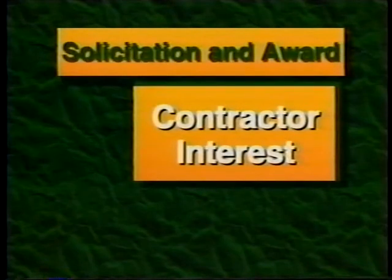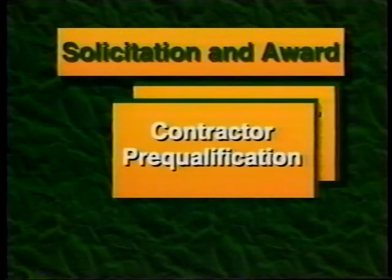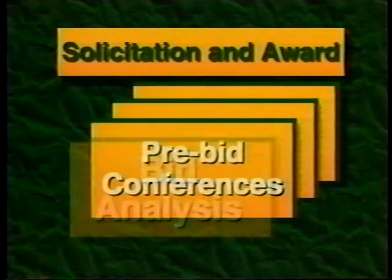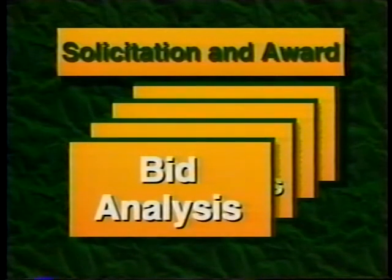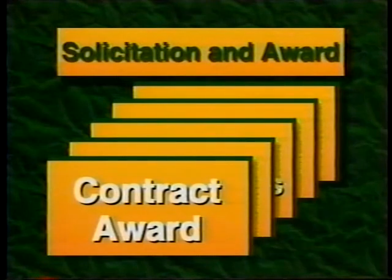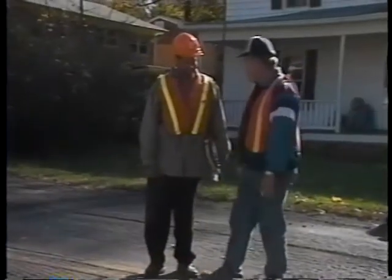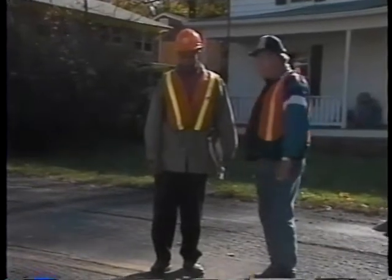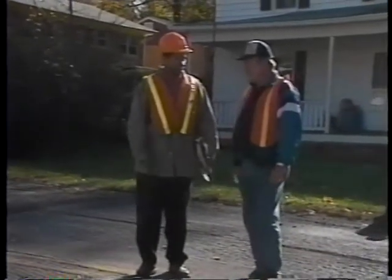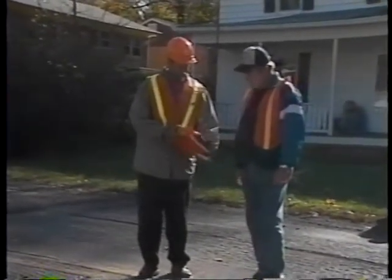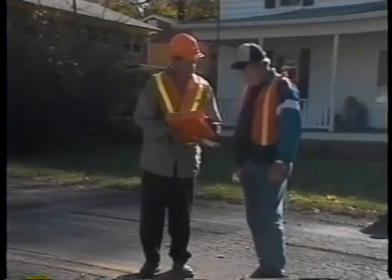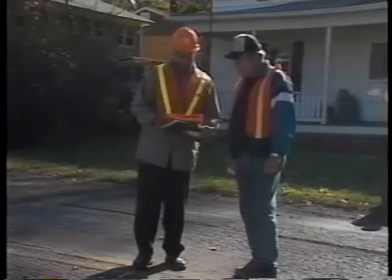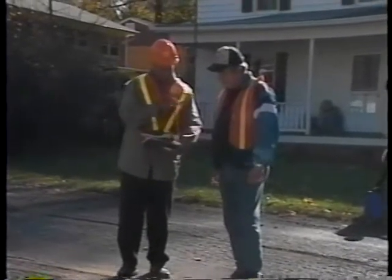The five components are: contractor interest, contractor pre-qualification, pre-bid conferences, bid analysis, and contract award. Agency personnel have many contacts with outside contractors at informal meetings, contractor association meetings, or even job sites. They should use this time to determine if there is contractor interest in a contract maintenance program.